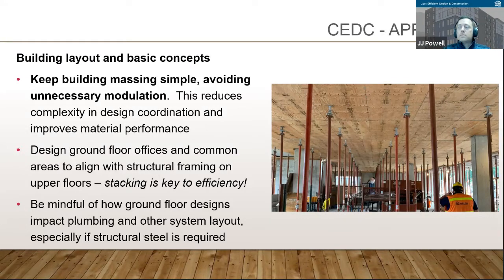At George Fleming, for example, we'll talk about it a little bit later, we were able to reduce. We thickened the post-tension concrete deck a bit, so it was the second floor, and we thickened it up a little bit. We added some material, but what we did was we eliminated any drop soffits in the concrete slab, and what that meant was we were simplifying that concrete slab, and we took about 4 or 5 days out of the schedule, just in that design move right there.